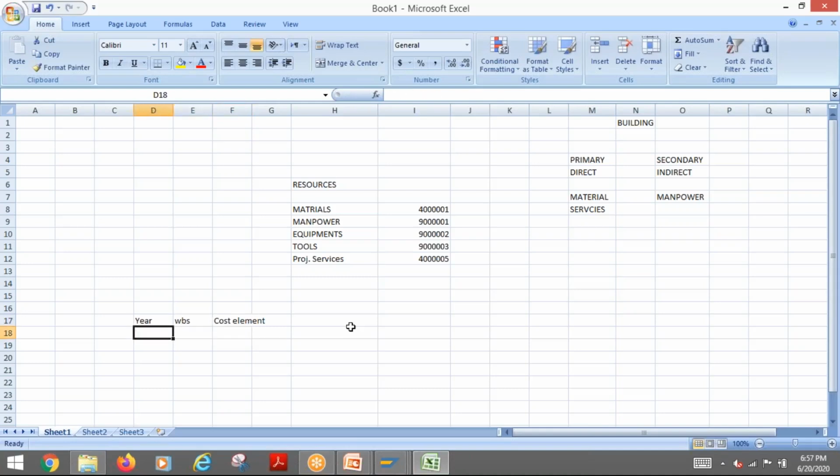So here there is a year, and there is an option whether you can have overall or by period. The WBS element you have to specify, each one. So it is a little bit cumbersome job when you do it manually, so it is better to go for some kind of BDC recording and Excel upload and all those things. SAP also gives some option where you can do some kind of configuration customization, and it is possible to do an Excel upload and all those.